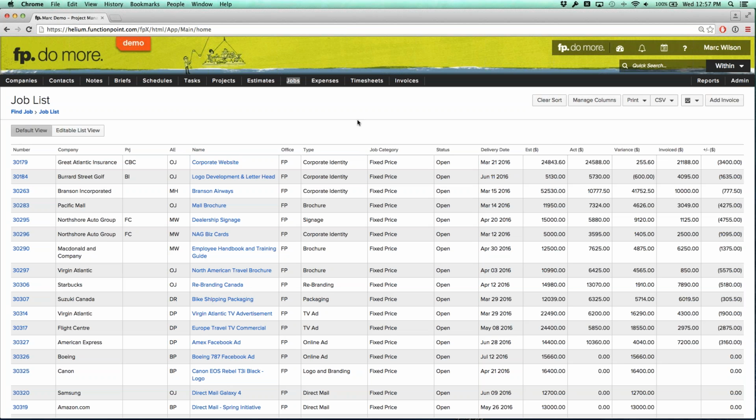And these things are usually decided by the person who's liaising with the client, whether it was an initial agreement when the job was first opened or based on a discussion. A lot of people I speak with these days tell me it's based on a discussion. You're working with the client, and the client has seen the most recent version of the design or the website or whatever it might be, and you say, okay, based on this milestone being hit, we're going to send you an invoice for another 25% or something along those lines.